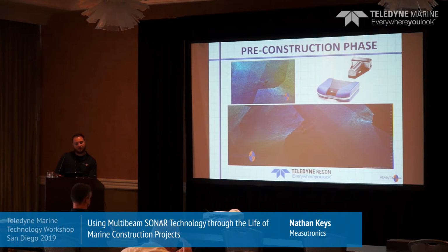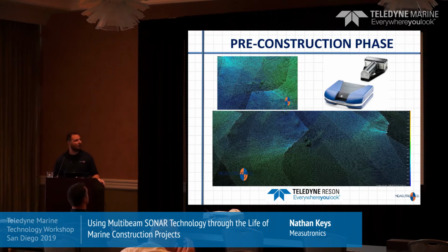So this one is done with a T20, and it's kind of hard to see with the lights, but there's an anchor in the center of each of these pictures. And so they found this anchor, and this is a bridge demolition project. And so basically in the contract it said, okay, demolish the bridge and pick up all the trash and get it out of there. And so they did the scan before they started. They found this anchor, and they found a bunch of other stuff too that was already down there before they started. And so they were able to go back to whoever awarded the contract and say, hey, there's stuff down there that we didn't put down there.